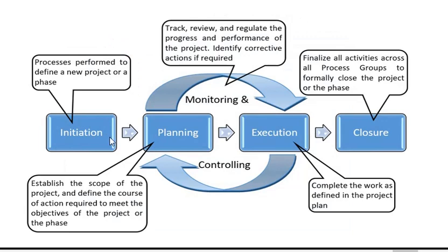So this is how the sequence of activities flow in a project life cycle. First is the initiation phase, that is project initiation, which is the starting phase where the project manager must prove that the project has value, it has potential, and is feasible. That is, it is something that can be accomplished. This includes creating a business case that justifies the need for the project, and the feasibility study to prove that it can be executed within a reasonable time and cost.